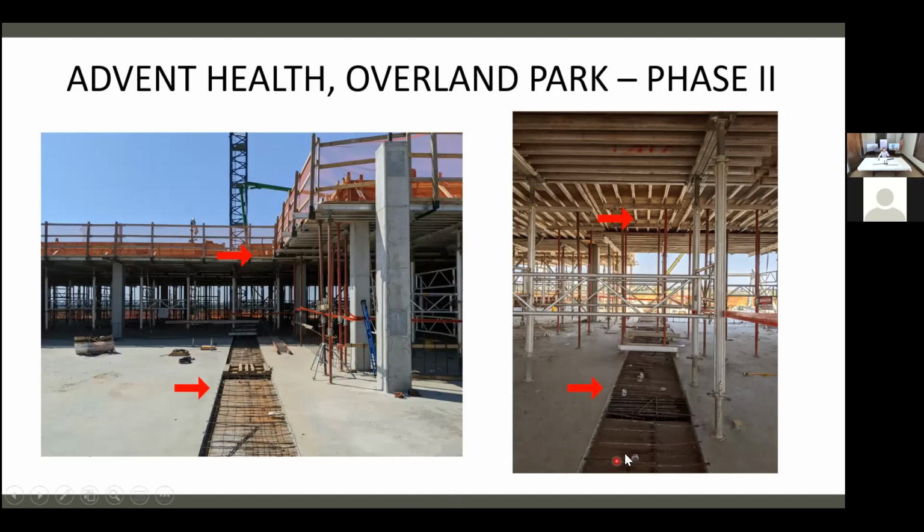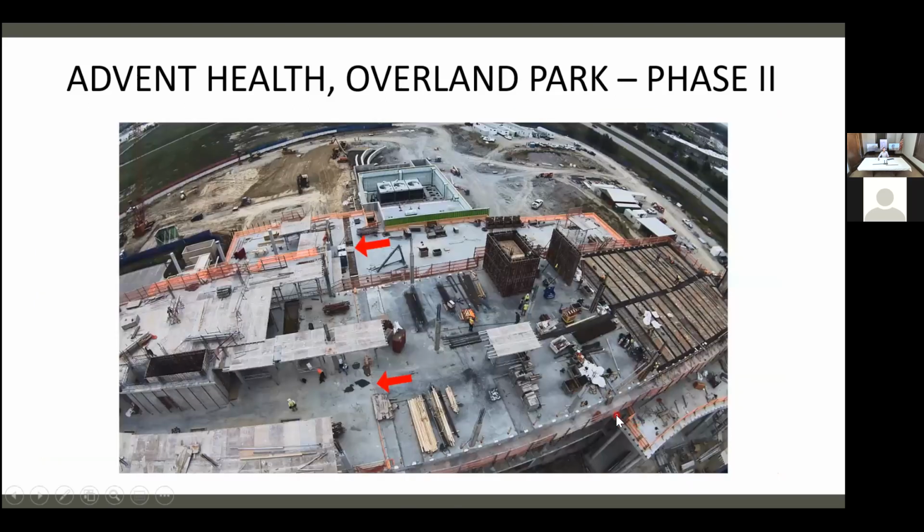Okay, for our system, you can just fly your forms normally. This is a bird's eye view from the crane, so you can see below on the lower side, that arrow, that's our pour strip right there. Upper side, you're seeing the open pour strip. And the leave out, I think 60 days or was this one 45, something like that. But you're saving all that time.